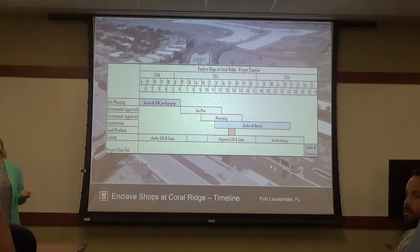I understand that, but I guess what I'm thinking is, why not, for example, at the same time that you're already looking for the anchor, working on the LOI, and have a team of lawyers, just separate the land right now? Was that an oversight? No, it wasn't an oversight. You have to negotiate a joint venture agreement with the other partners, which is separate from the one you already have, and you're doing all of those moving parts. The goal would be to have it all done in time, but by the time you negotiate that and then get the lender in place, it dragged out a little longer than the date we needed to start construction.